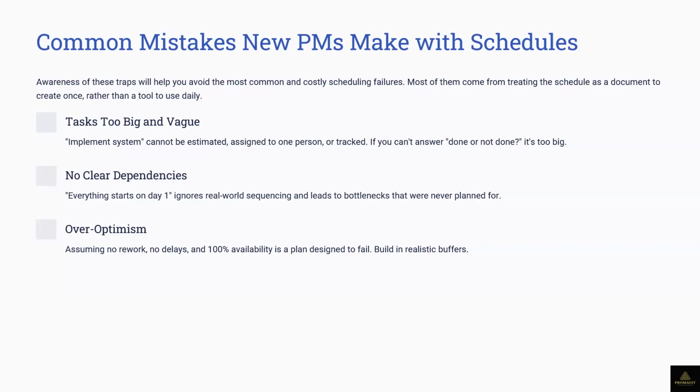There's an activity A that's going to last for 10 months. Let me make it very realistic now. There's another activity B that's going to last for maybe 1.5 years. Now, the resources on activity A can also do activity B. But because we want to run them in parallel so that our schedule can be shortened, we don't want this one to finish first. Because if this is going to be 10 months and this one 1.5 years, and you run them finish to start, when this one finishes, then we can start that.